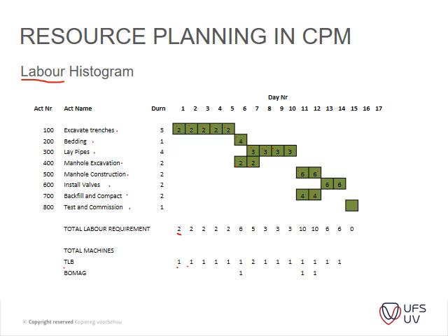And then for your bedding, that is now for putting it back into the trenches. There you can actually use 4 people. You still need 1 TLB, but it goes quick. It's just a backfill, and then you've got compaction, so you need a Bomac, and you need your TLB. But there you've got 2 items going. You've got your bedding going, and you've got your manual excavations also running at the same time. So it's very simple. You take your Gantt charts according to your planned amount of work, and then you just allocate resources to that in your Excel spreadsheet, and per day you add it up.